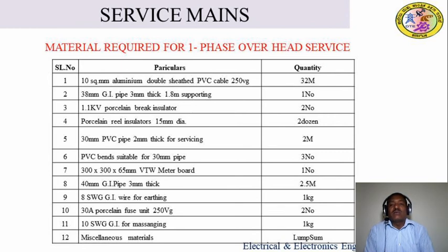We provide this list to the shop owner, and without asking about any material specification he can directly give the material. Therefore the schedule of material is very important, writing all the material names with their specification along with their quantity.